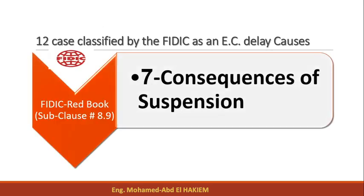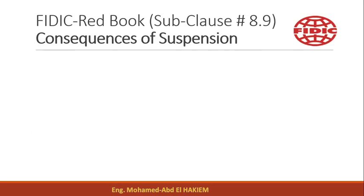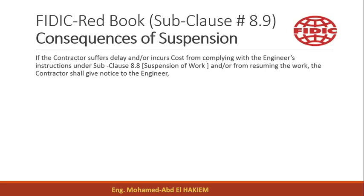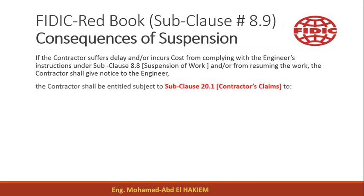Cause 7 – Consequences of Suspension. If the contractor suffers delay and/or incurs cost from complying with the engineer's instructions under subclause 8.8 – Suspension of Work – and/or from resuming the work, the contractor shall give notice to the engineer and shall be entitled subject to subclause 20.1 (Contractors' Claims).